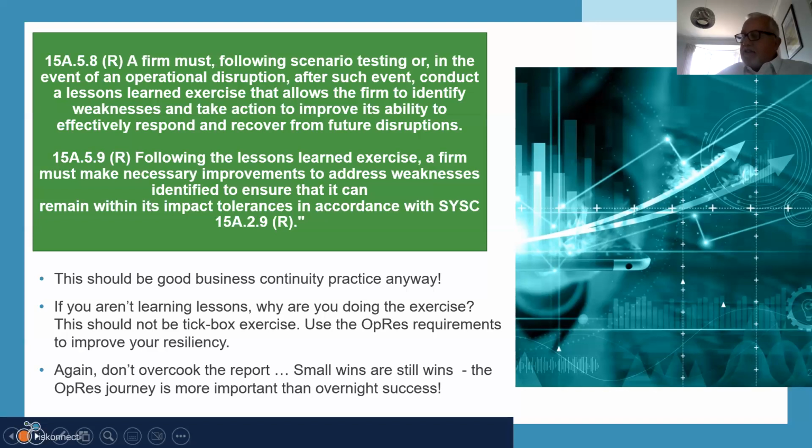And I think as well, to the lessons learned, make sure, and this is one of the requirements that the regulator has, that if you do have any actions, they're assigned to somebody, because when you come back again, you need to be able to make sure that person has actually updated it and fixed it. If one of those is we need to improve the RTO, or we need to improve the resilience on a bit of technology, then make sure there's a plan in place to make that happen. So when you come around again, you have actually learnt the lesson.